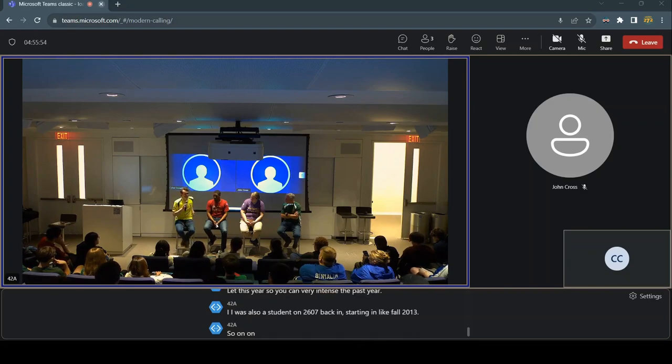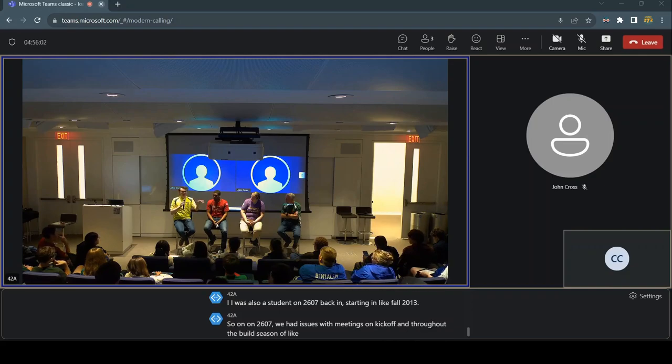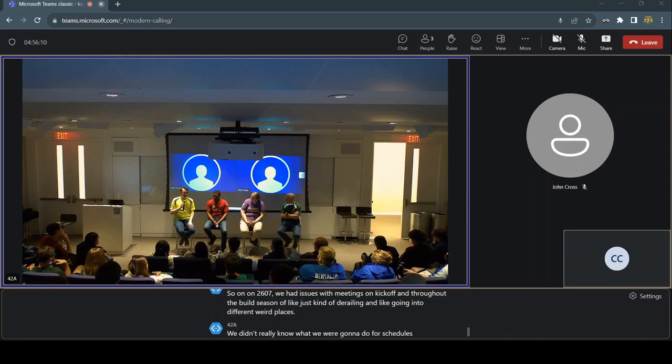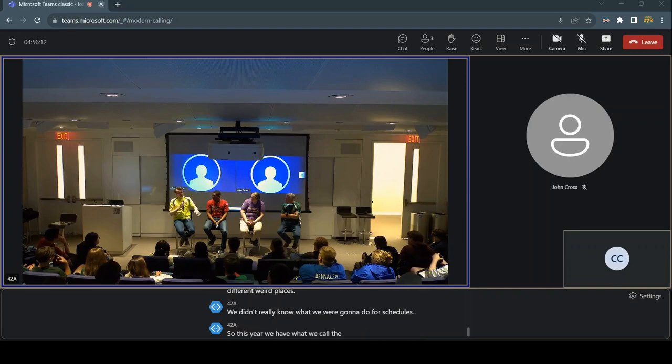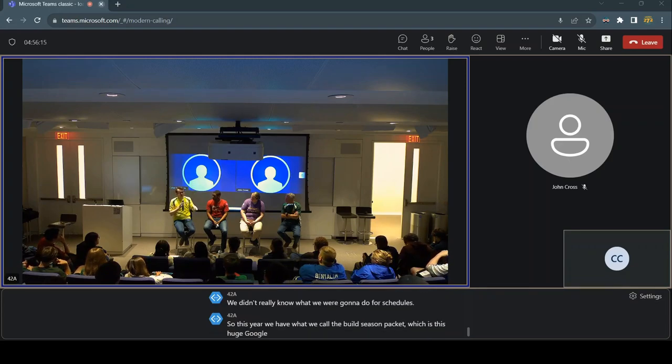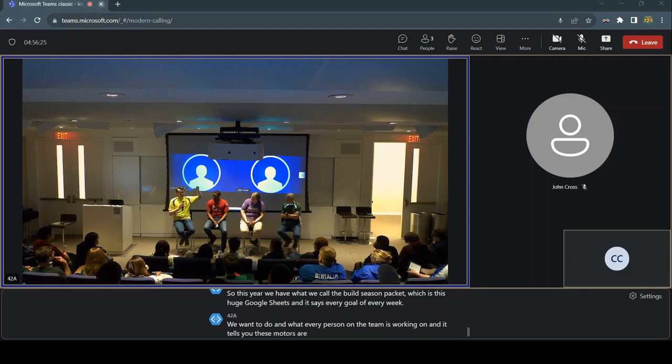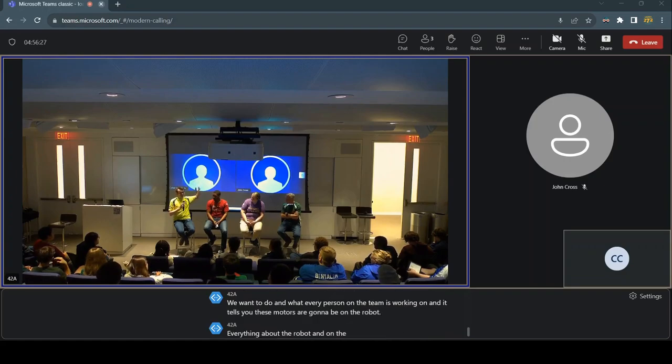On 2607, we had issues with meetings on kickoff and throughout the build season of just kind of derailing and going into different weird places. We didn't really know what we were going to do for schedules. So this year we have what we call the build season packet, which is this huge Google Sheet. It says every goal of every week we want to do and what every person on the team is working on. And it tells you, these motors are going to be on the robot. Everything about the robot and on the team is in this one huge Excel document.